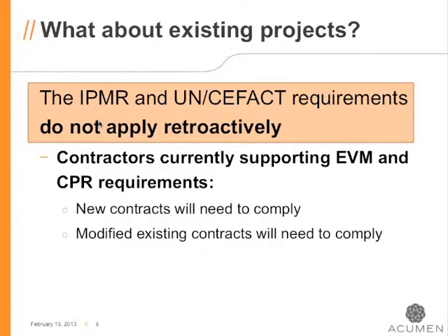Big question, very common question that I've heard in a number of different forums. What about my existing projects? Is there anything that I need to do? I'll tell you right away, by default, the new requirements don't apply retroactively. The contract still prevails.